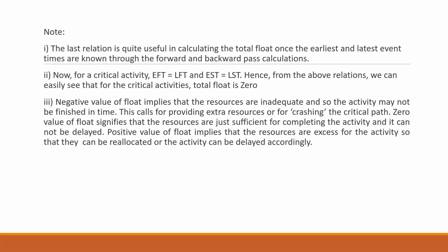Crashing is nothing but shortening or compressing. We are going to do crashing as a different topic. So if we get a negative float value, we'll be using the technique of crashing so that we can shorten the overall duration of your project, or compress it. Now, zero value of float signifies that the resources are just sufficient for completing the activity and it cannot be delayed, especially the critical activities.